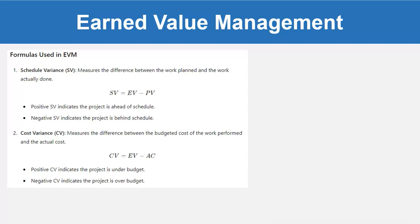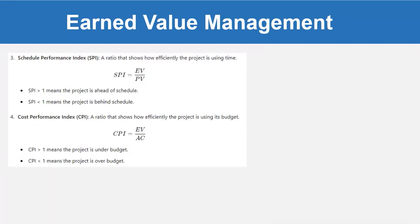Cost Variance (CV) measures the difference between the budgeted cost of the work performed and the actual cost. The formula is: CV = EV minus AC. A positive CV indicates the project is under budget, and a negative CV indicates the project is over budget.